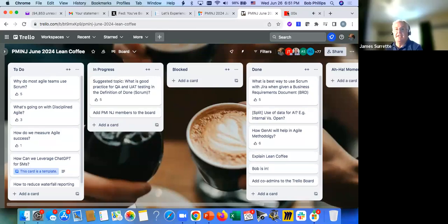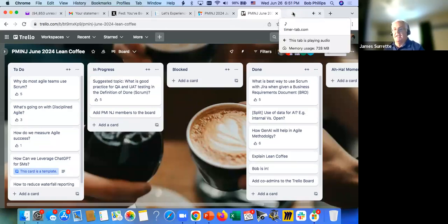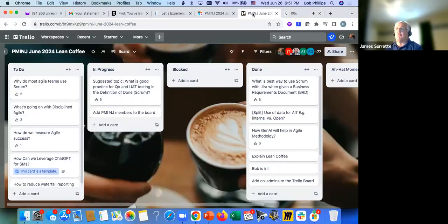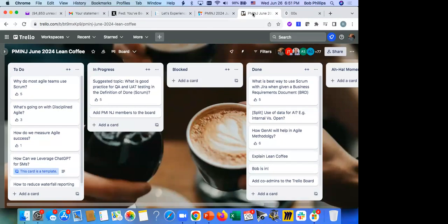I think that's key, makes sense. You need to have a solid definition of done that the whole team agrees to as part of the working agreement before the sprints even kick off, because you don't want to have half the developers feel it met the definition of done, and the other half feel it didn't. You want everyone to be consistent. Product owner, scrum master, everyone strictly adheres to what the generic definition of done is for all user stories, which would comprise having the acceptance criteria written as well. Yep.